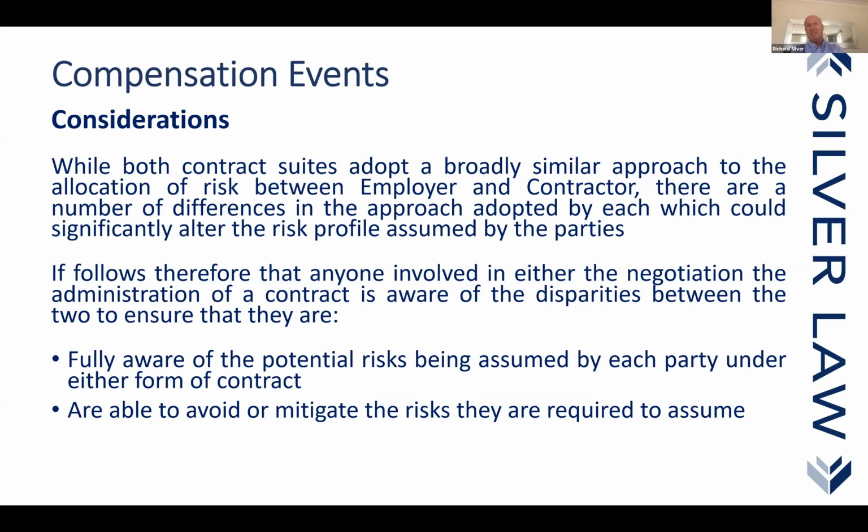And as such, we hereby give you notice that should you not respond within the next 2 weeks, this will be deemed a compensation event. Now, you might not want to put it quite so formally because, let's be honest, you're going to try and get away with it so that the PM doesn't notice, but it needs to say words to that effect.